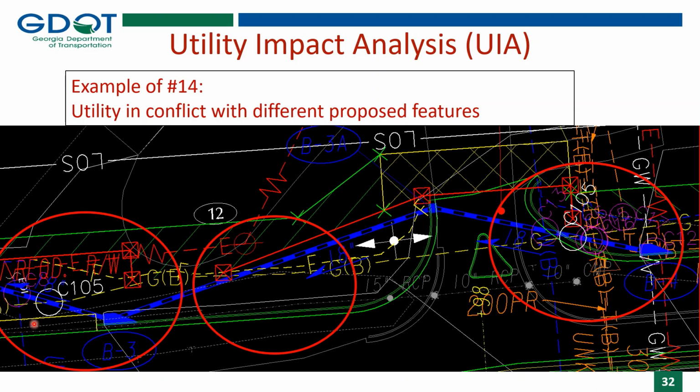So because this is a continuous system, it's not connected to the previous system between B1 and B2. This is a continuous drainage system. We will keep the same conflict number throughout. There's no need to put a conflict number in the middle, but we want the conflict numbers to be at the start of the conflict and at the end of the conflict.